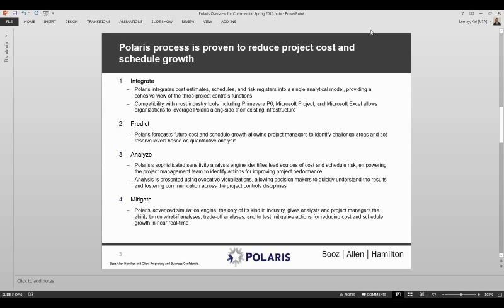The last piece of it is really looking at that risk register. When we think of risk, we look at risk at a higher level. It's an overarching thing for the project. What this really does is it's just a quantitative risk analysis. We look at risk, we quantify those risks, we then map them to the individual tasks within the schedule, and we look at that to say, what's really driving risk within our project? We can take that information to map into individual tasks, put some sort of impact associated with that, and really see what's driving the cost and schedule issues within our project.